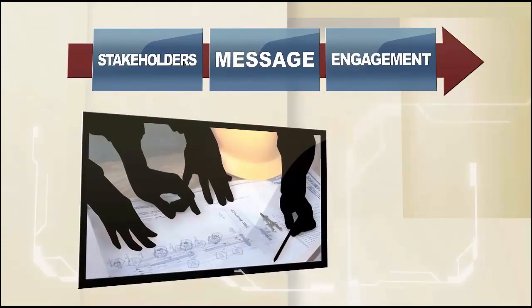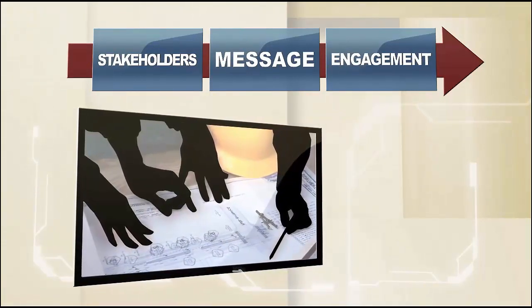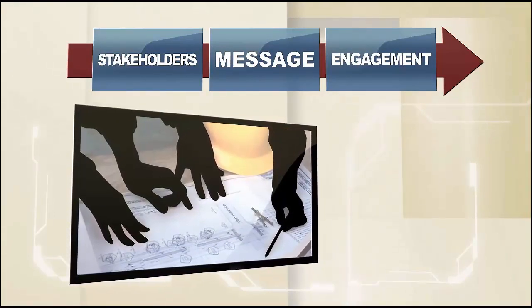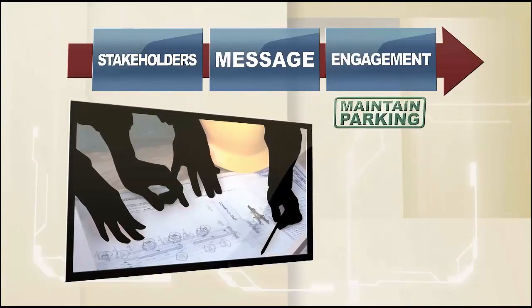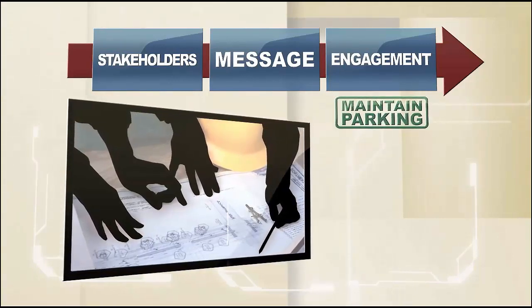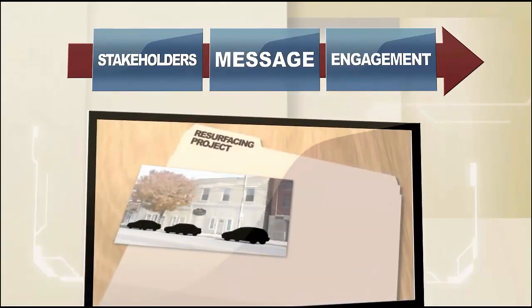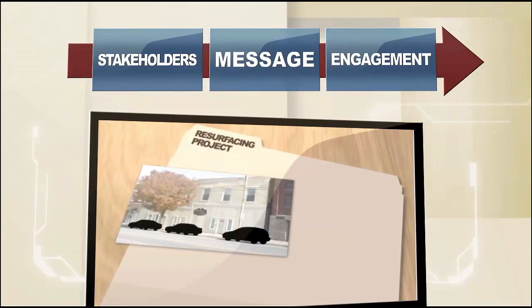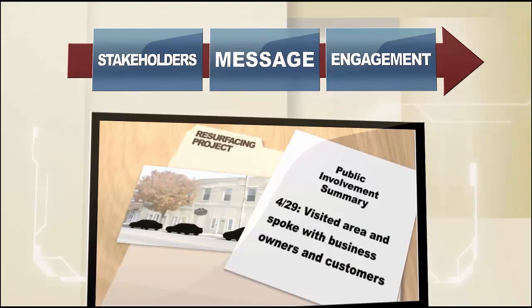To satisfy the concerns of the business owners, she coordinates resurfacing of the westbound lane to take place during the first week of work and the eastbound lane during the second week. In this way, she's able to maintain parking on one side of the street at all times. The project manager summarizes the outreach efforts and actions taken to satisfy the needs of the business owners in a note that is attached to the NEPA document.